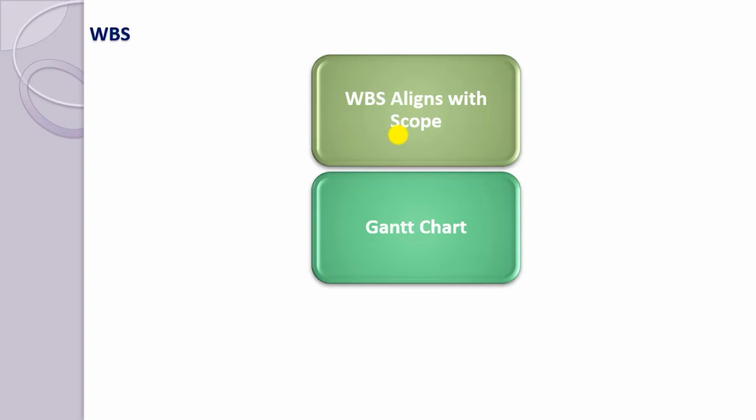So this is just a brush-up session for project management. It's on the basic level of project management. Then comes the Gantt chart. A Gantt chart is the diagram most people think of when they hear the words project plan. Mostly it is used by all the companies and by most project managers. Traditionally, it lists the tasks involved in the project on the left-hand side, with bars representing each task duration overlaid on a calendar to the right. As we know, things are changing, so nowadays the Gantt chart is available in the Microsoft Project software, and it can be easily used.